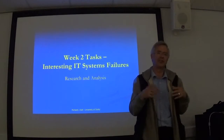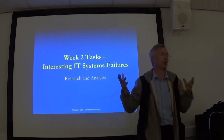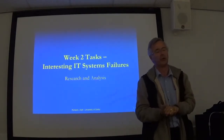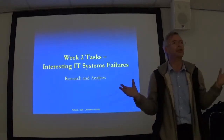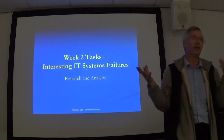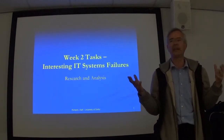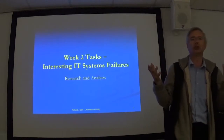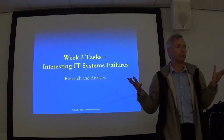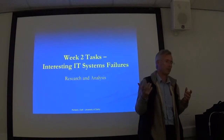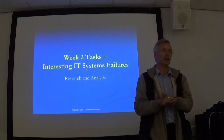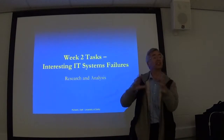When developing a requirements specification, business analysts and systems analysts go out and talk to the sponsoring senior managers and all of the users currently doing the job. They then apply the Pareto principle — the 80-20 rule — choosing to implement the 20% of functions that take up 80% of the workload, and ditching the other 80% of functions that deliver only 20% of the workload, saying it doesn't exist any longer.